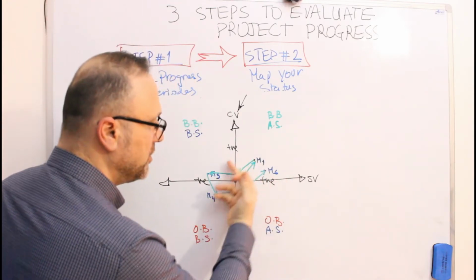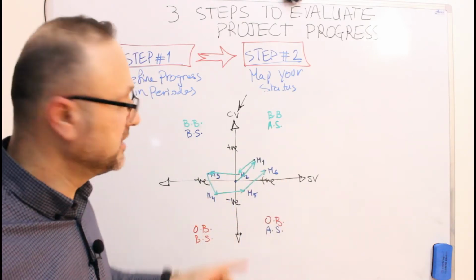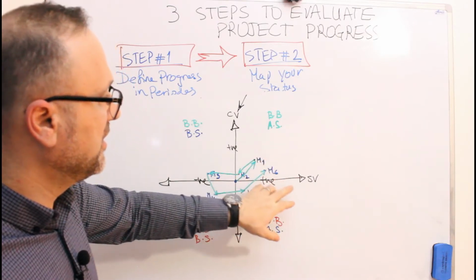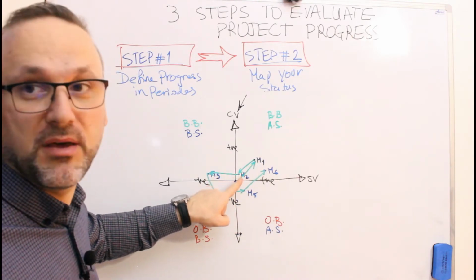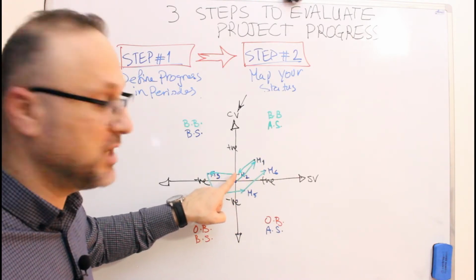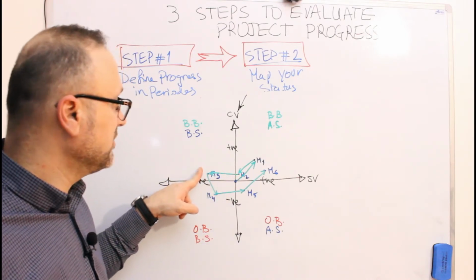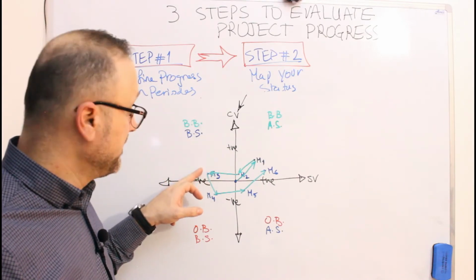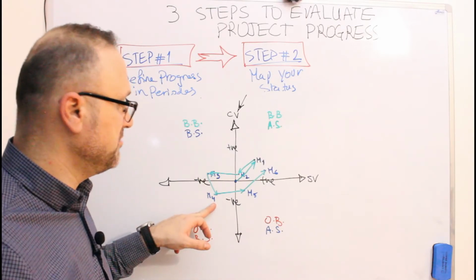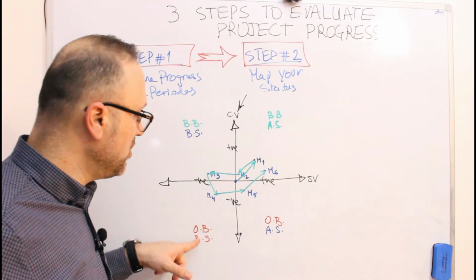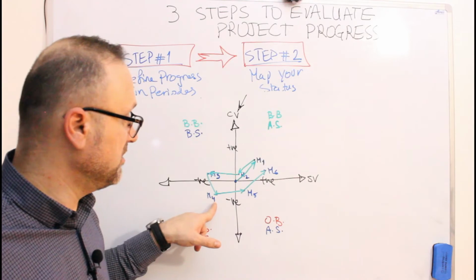So you can see the flow of the behavior of your project starts from being below budget, ahead of schedule, dropped down in month number 2. Your progress has been dropped down. In month number 3, you've been behind schedule and you are still in budget. So something went wrong. Effects has been more in month number 4, where you went below the schedule and over budget, being over budget in month number 4.